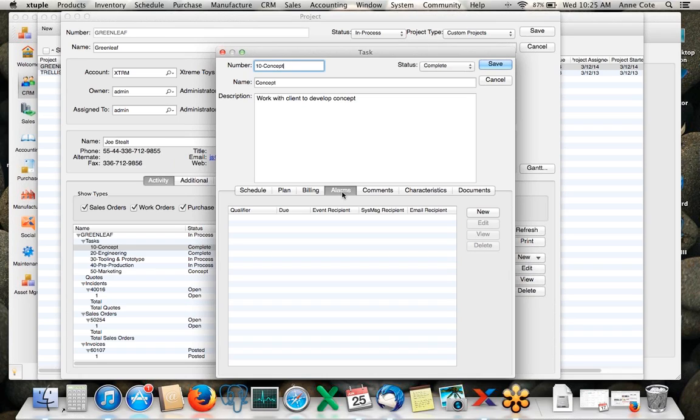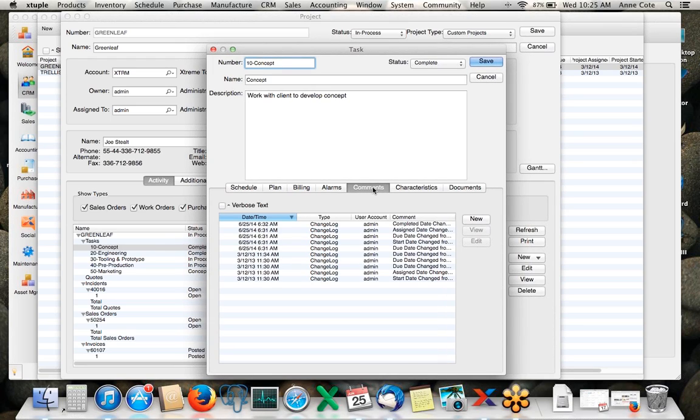as the project team members are creating timesheets, once the timesheets are approved, it actually generates an invoice that you can send directly to the customer. So that's pretty slick if you're doing services. Sorry, there's some background noise here. So that's what the billing tab is related to.